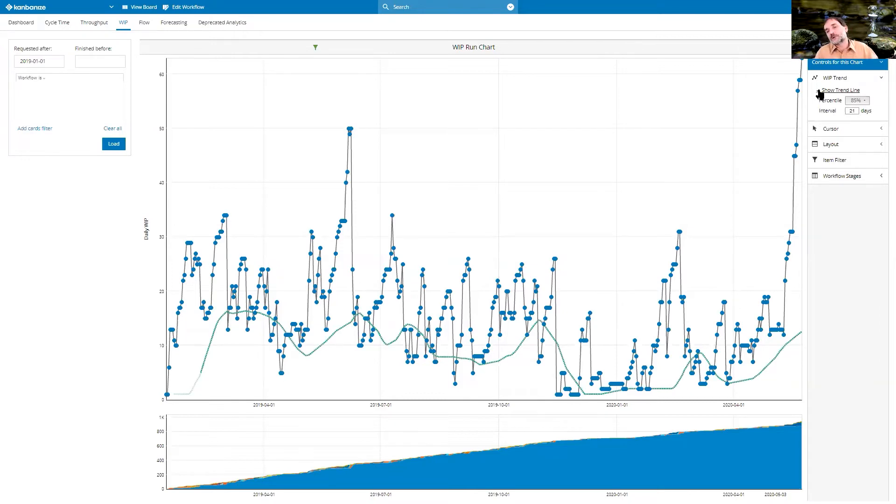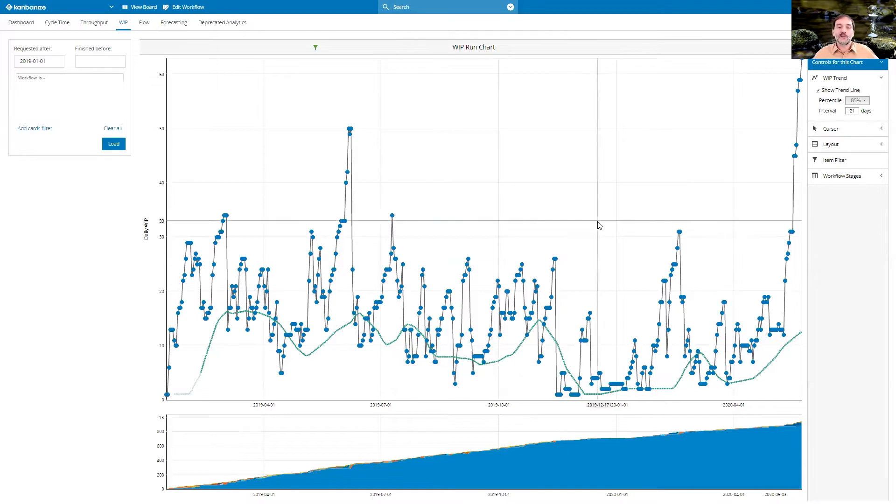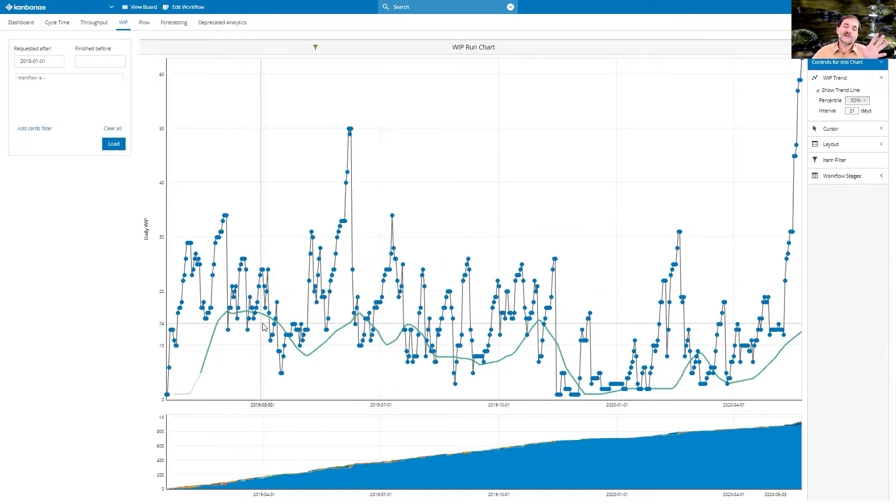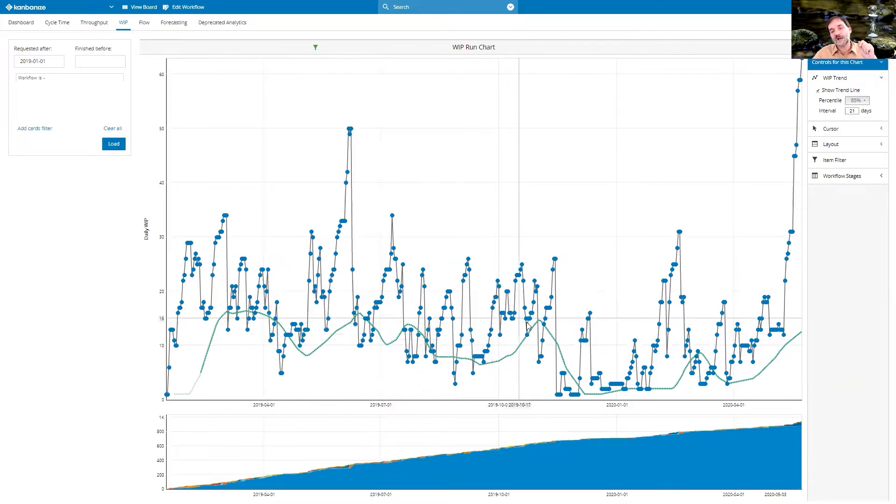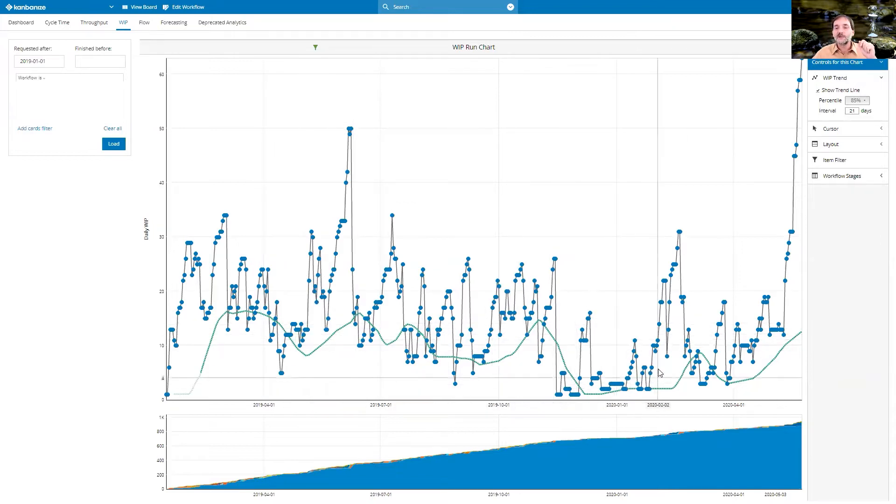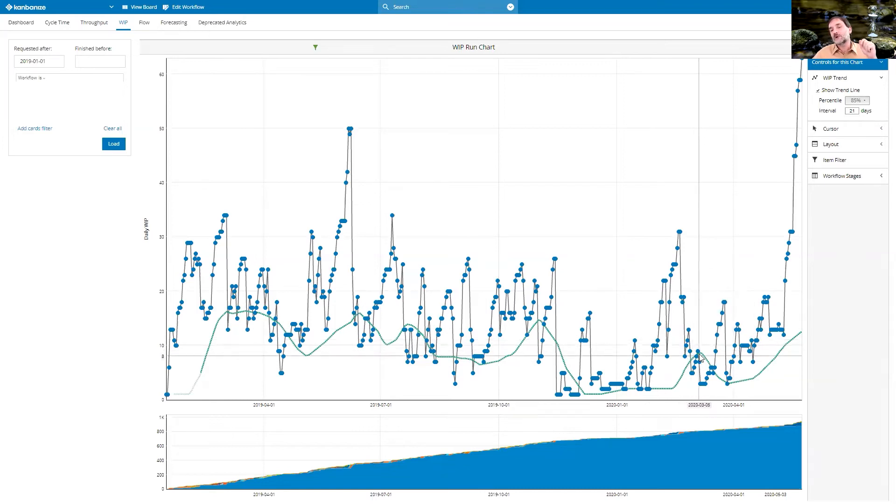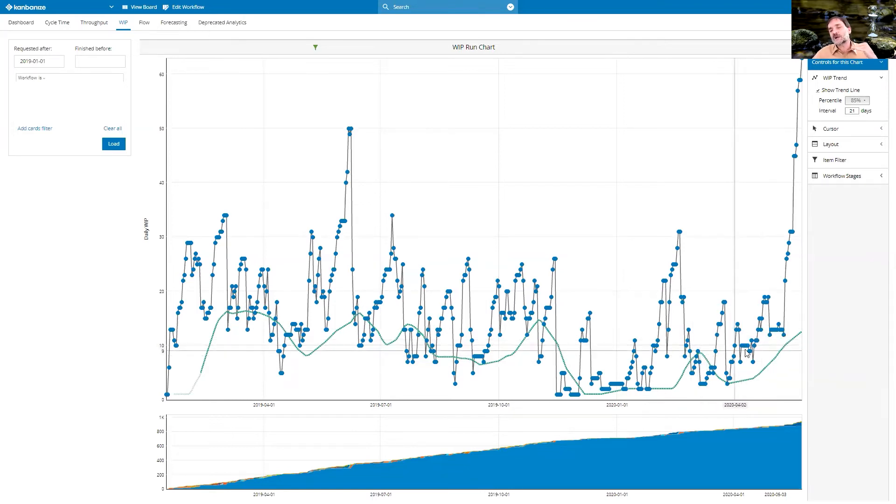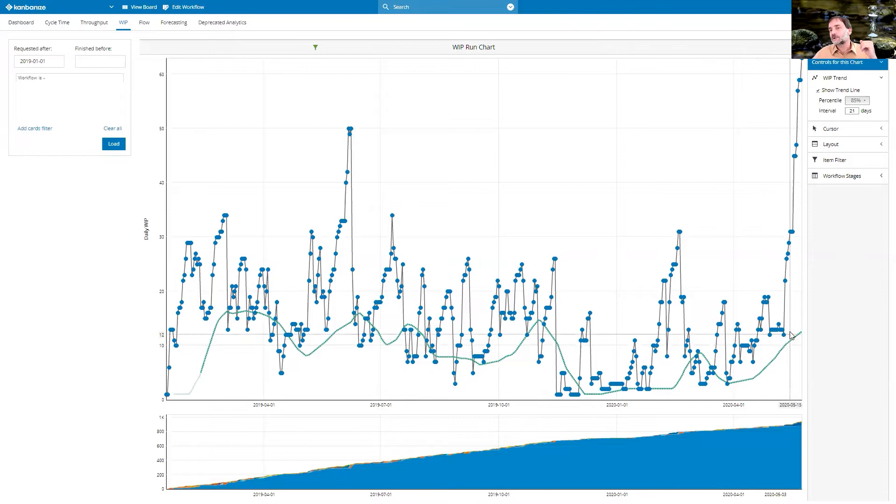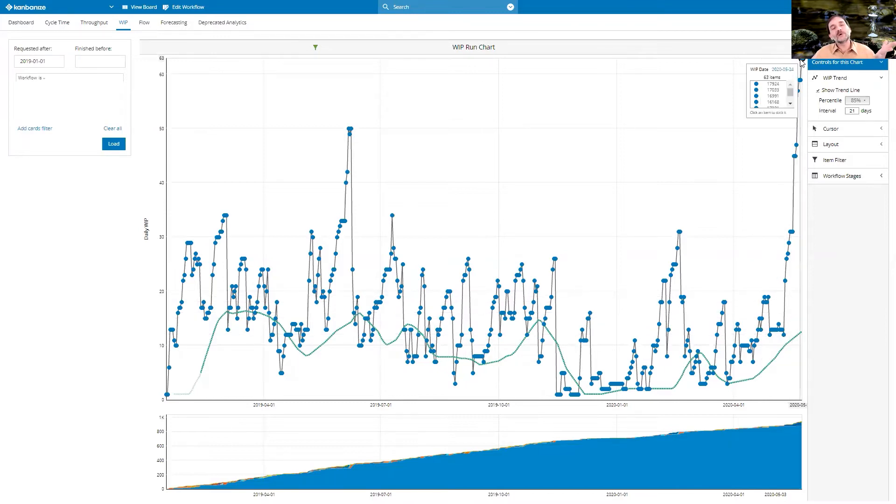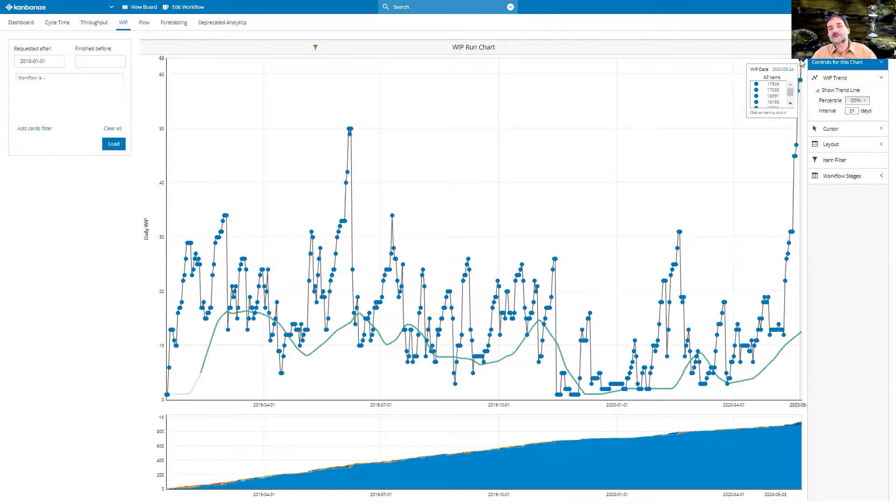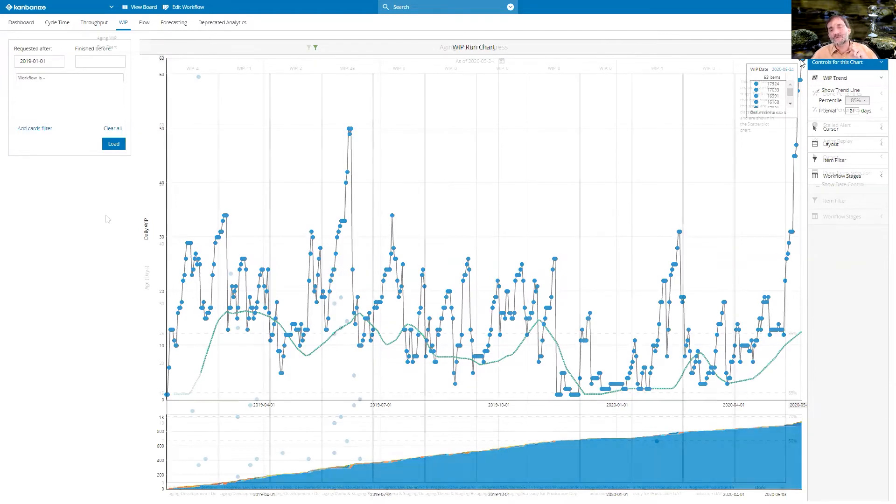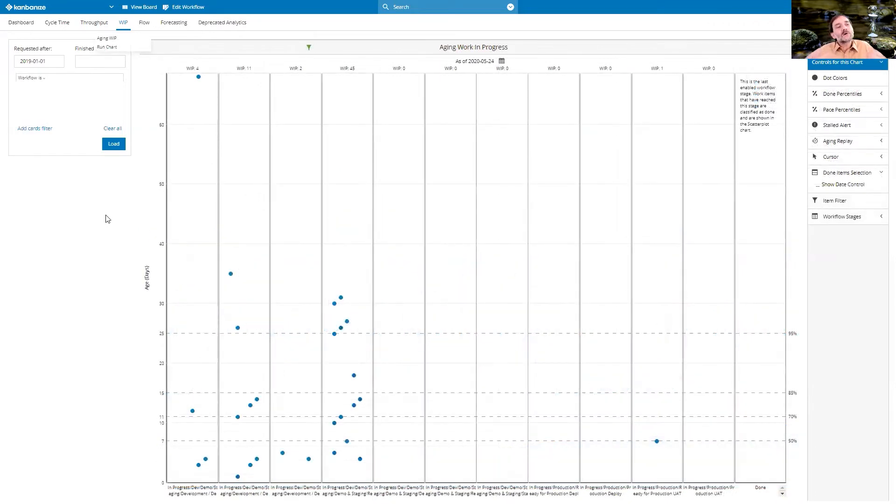At the moment, I put a trend line with an interval of 21 days. So in the last year, we were sitting at around 15 tickets at any stage, then came Christmas, there it went up again. And then we actually stayed quite low. But suddenly what's happening here? If we look at the end of May, we suddenly have a work in progress of over 60 items.